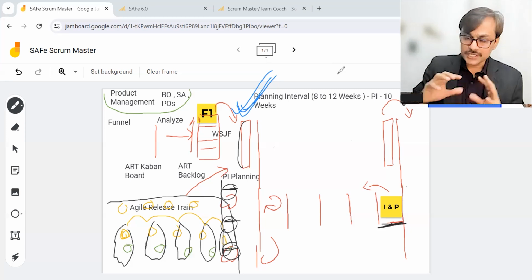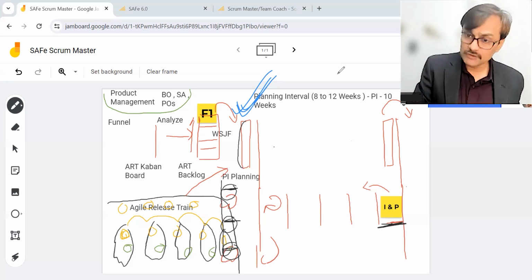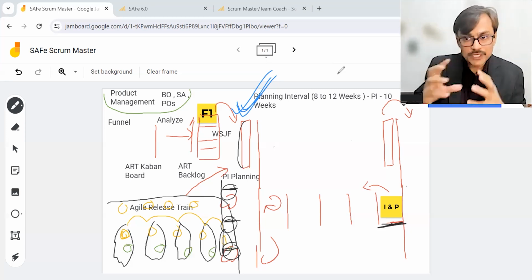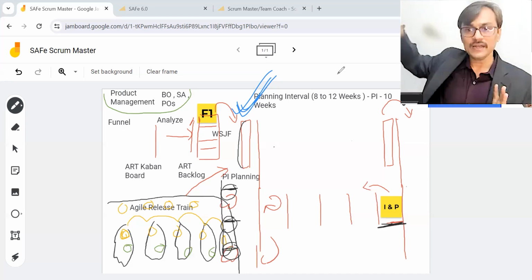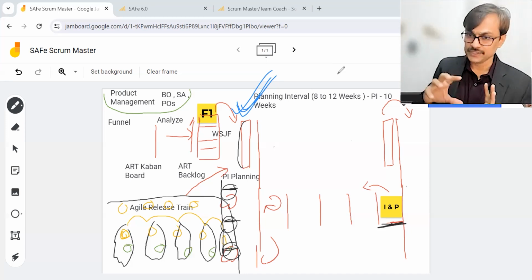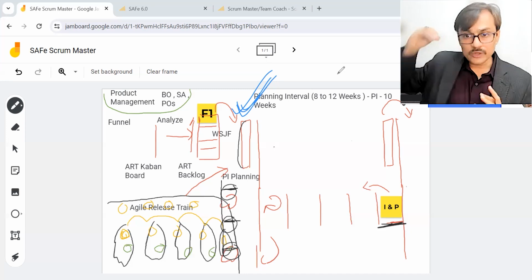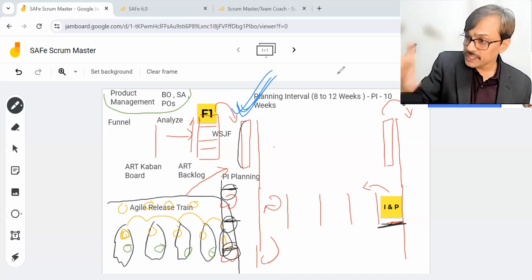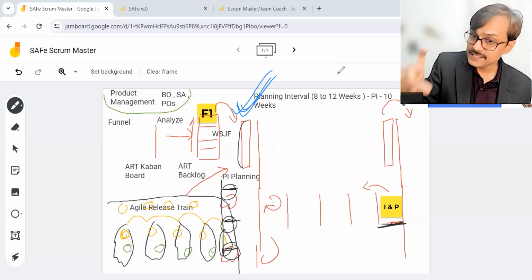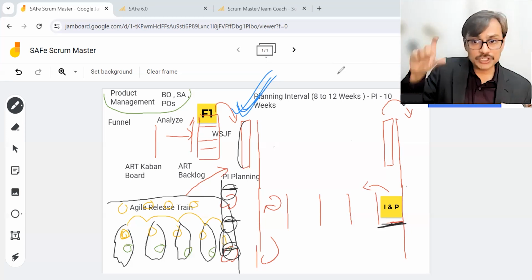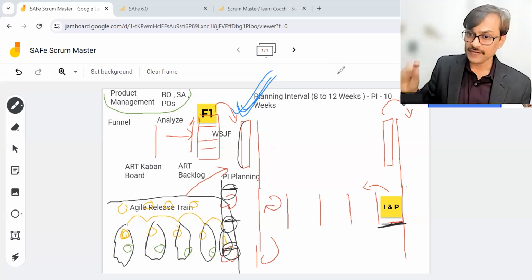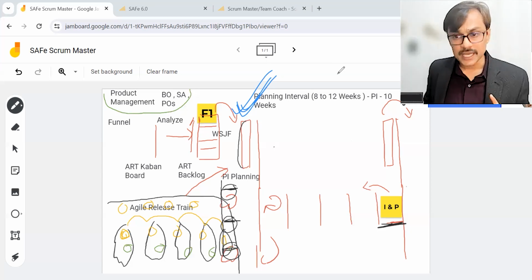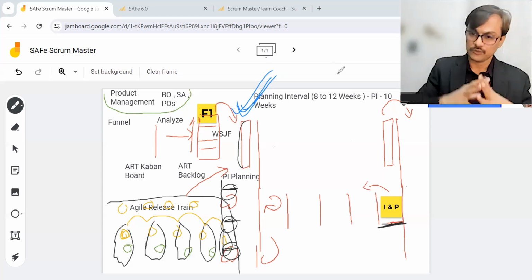In the breakout sessions, whatever preparation we have done for our PI planning meeting, we need to ensure it is fitting well with other agile teams. So as a Scrum Master, my role is very critical during those breakout sessions: I facilitate the work well. I ensure dependencies and risks are well identified. And I also work with other agile teams so that we can integrate that work.